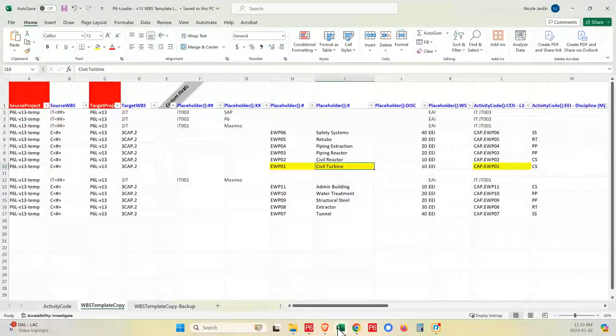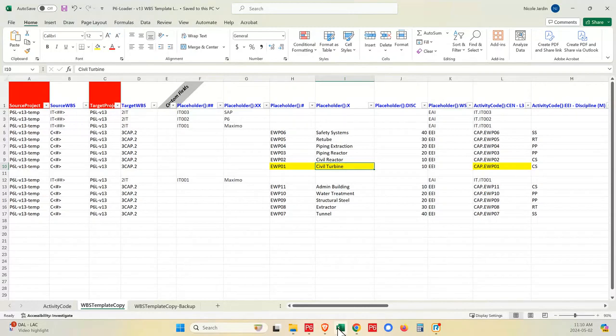So we rebuilt the schedule, I have to say, more than once, and it took us only a few hours to rebuild it on the last pass when they decided, no, the template's no good, let's kibosh it all, and let's load it all again, okay? We can load it very quickly because you make the template modifications, you delete everything. In that scenario, it made more sense to delete everything. And then rerun the list.